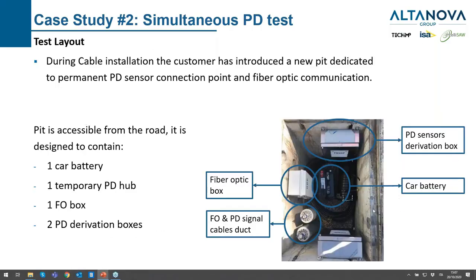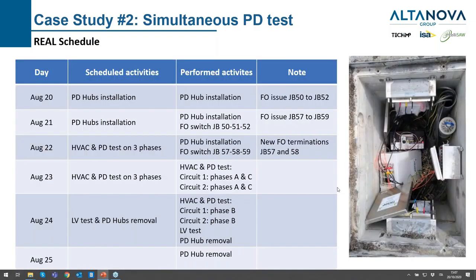During the cable installation, a dedicated pit for PD testing was prepared, with fiber optic signal cables and PD derivation boxes from the two different circuits — three channels from each circuit. There was room enough to install a car battery and the PD temporary hub. This was the six-channel installation with all the fiber optic necessary to perform the test.